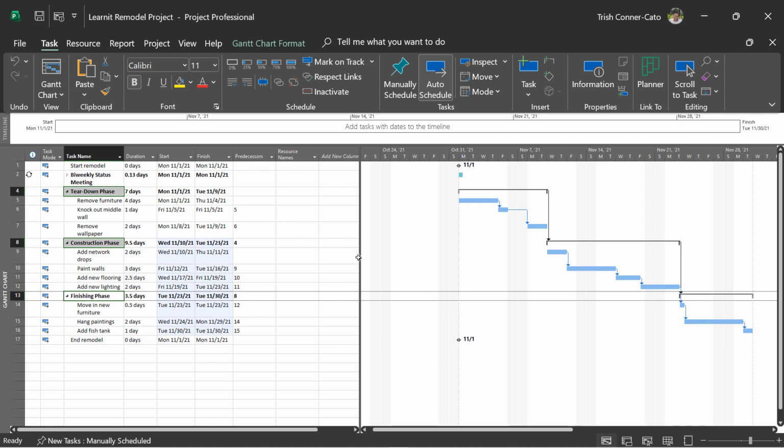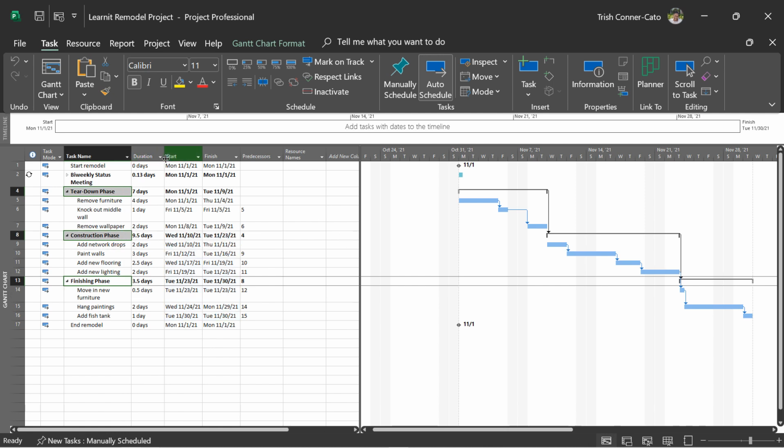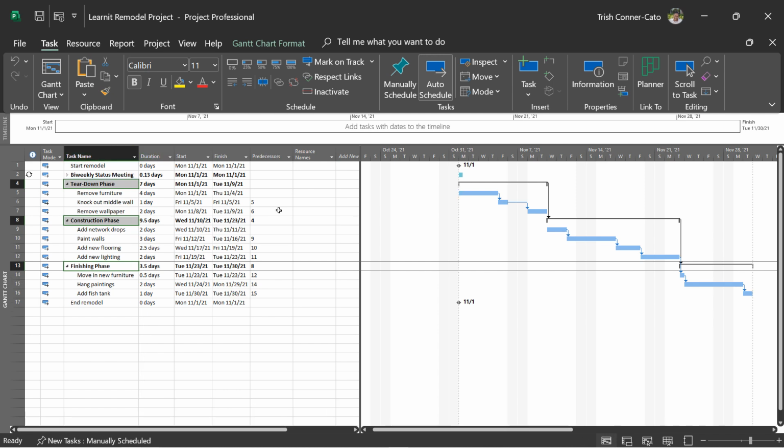The last thing we're going to do is we want to show our work breakdown structure numbers. There's a coding system, known worldwide in project management, work breakdown structure. And we're going to insert the codes. It gives a numeric listing of the codes for tasks. Oftentimes in meetings, the codes are referenced and not the name of the task.